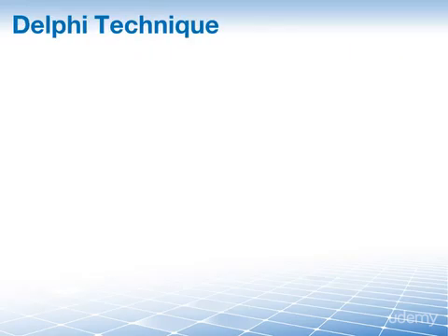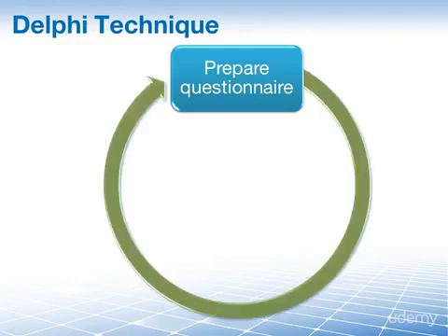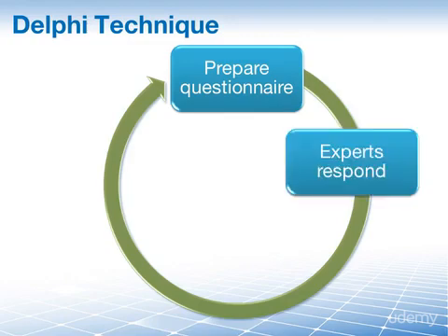In addition to brainstorming, project teams can use a method called the Delphi technique to identify project risk. The goal of this technique is to gain consensus from a group of risk experts, questioned anonymously about project risk. And here is how the process works. A facilitator begins by giving each expert a questionnaire that is designed to solicit ideas about important project risks. The risk experts then provide responses to the questions in the survey. Again, this is done anonymously, which removes many impediments that might otherwise affect the outcome.